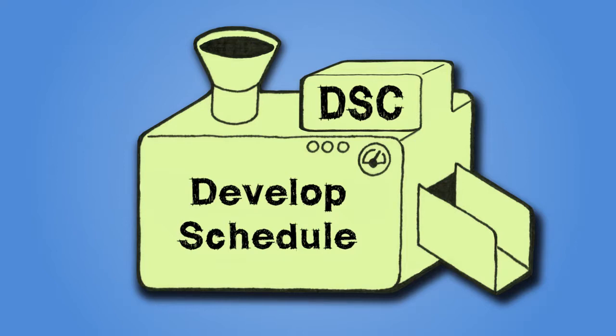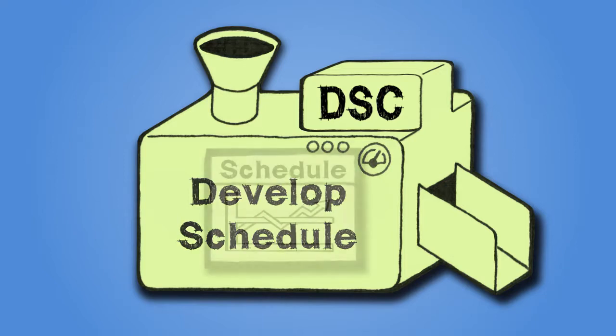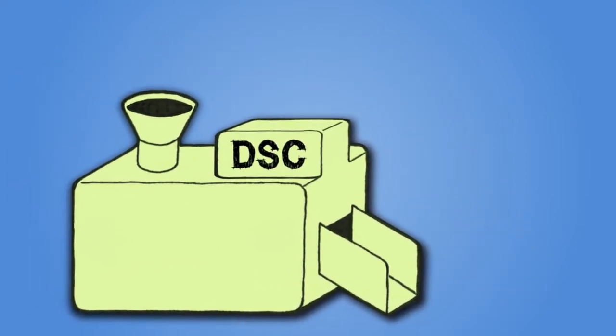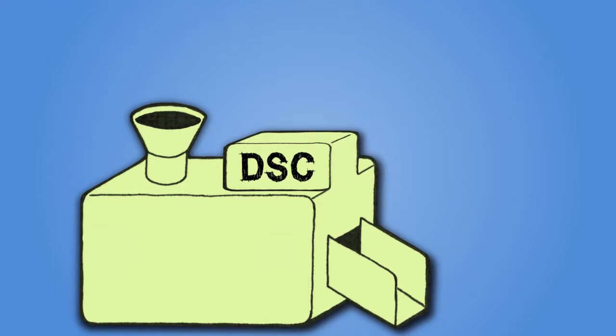Developing the schedule is usually an iterative process that allows for changing resources and changing activity sequences. This process also creates the schedule baseline, which, once approved, is the document that will be used to track the project performance. There are a lot of inputs into the develop schedule process, but all of them are outputs from the previous processes, all except for one.